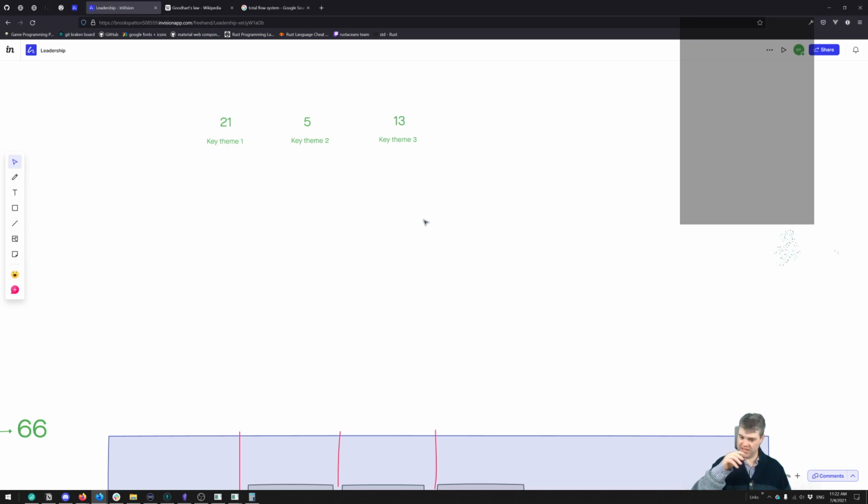Estimating the points is really hard. So for the first one, just choose the simplest one that you know and assign it a 5. Notice that I don't assign it a 1 because we might later on decide that actually, that's less than this. If you start with 1, you can't ever go smaller. So start pointing at a 5. So there's several options below it just in case.